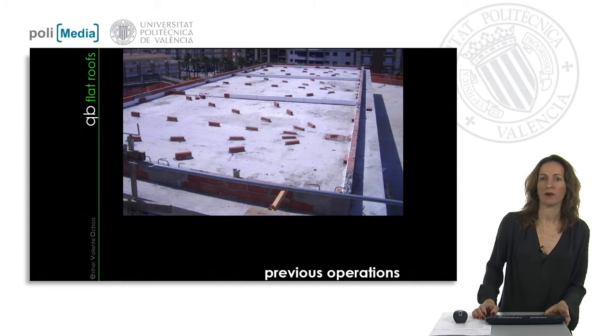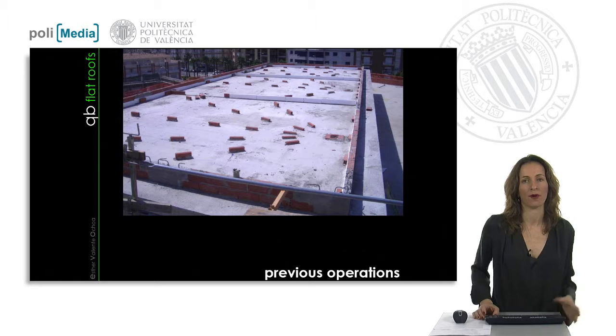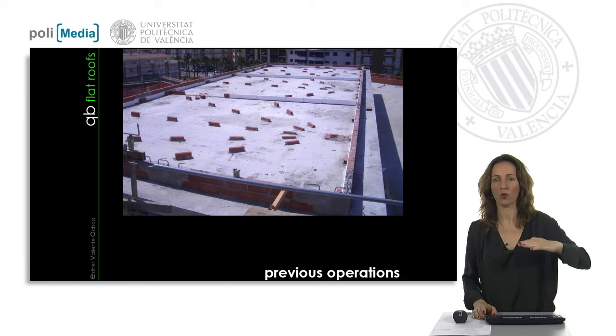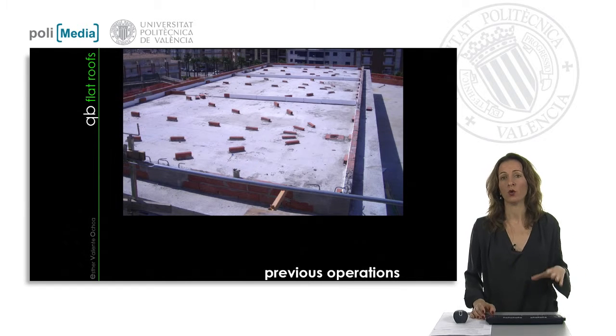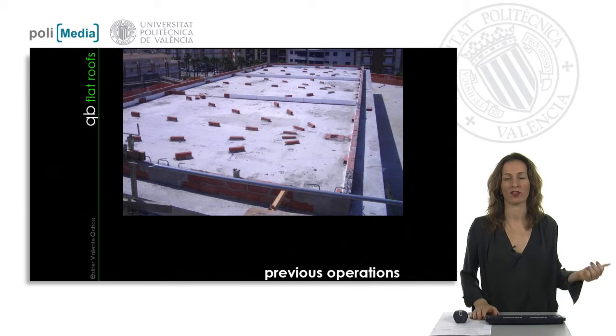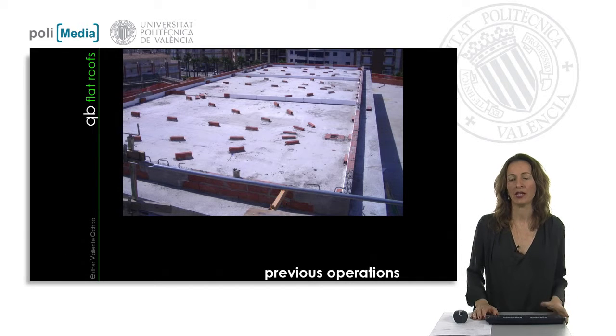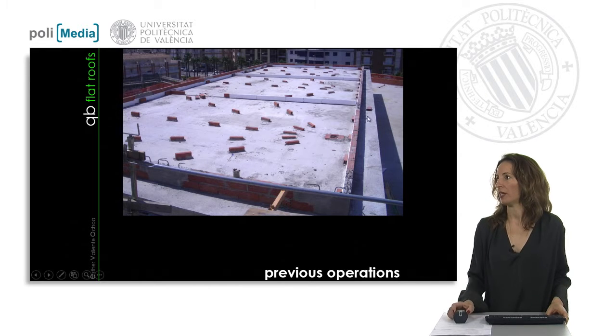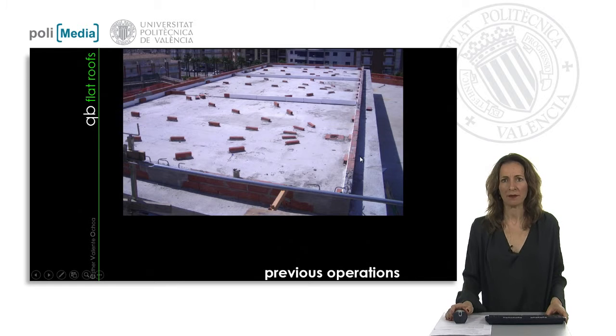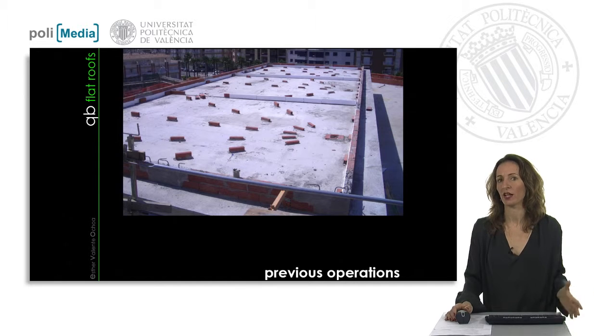Previous preparatory operations need to check the prior unit. If the element supporting our flat roof, the basis, is completely finished and all the certifications from the concrete results and so on are okay, we are on time to start with our roof construction. Here we can see how the boundary makes the limit or perimeter area of our roof, and in the inside area we have divided it into 3 units. Each unit will have its own specifications and its own checklist.